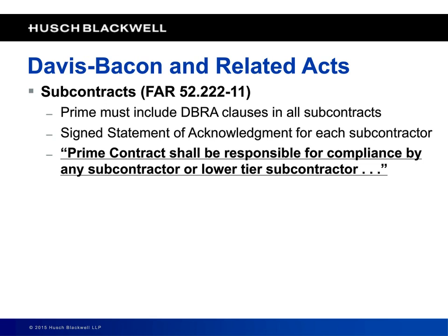And then the last thing that clause says, and this is something that's repeated throughout the Department of Labor's regulations, the prime contractor shall be responsible for compliance by any subcontractor or lower tier subcontractor.